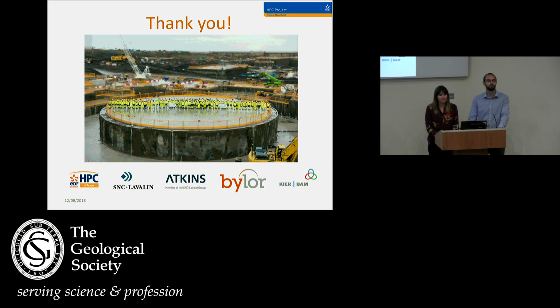Stuart Baltimore from Atkins. Question for Gemma. The ground anchors you put into the wall, did you actually put in instrumentation to see how the load came onto the anchors? Yes, we do, and they've also got triggers that we monitor. Atkins look after those and specify them, and then they're monitored by Kier BAM. Along with the face monitoring, the inclinometers, the piezometers, and the anchors, they all form part of the triggers for the breaches, and they're monitored daily. If anything were to exceed their design limits, then they're all sent via SMS to our phones.